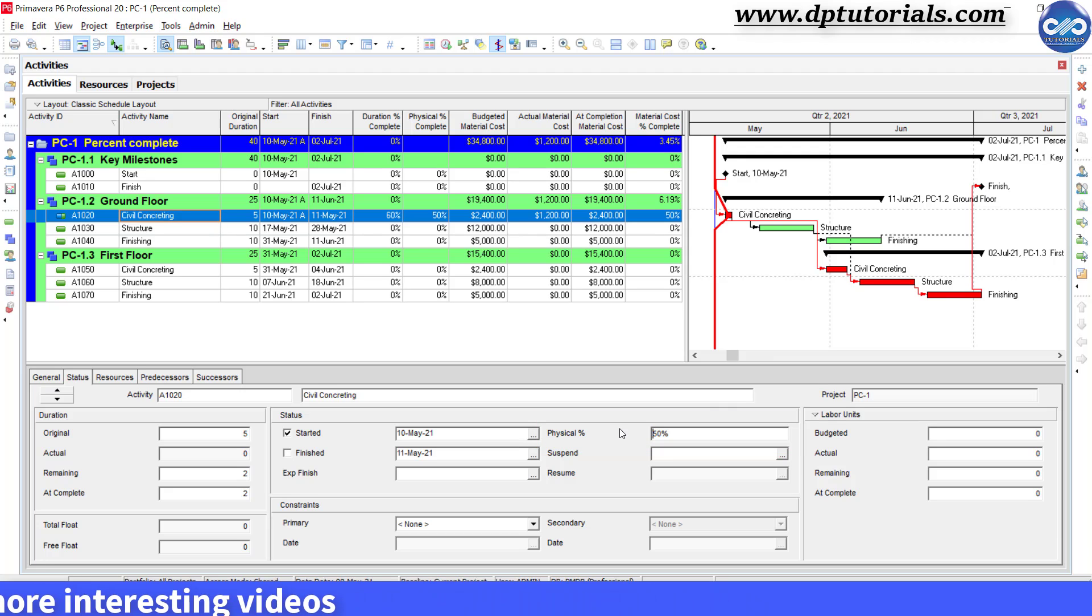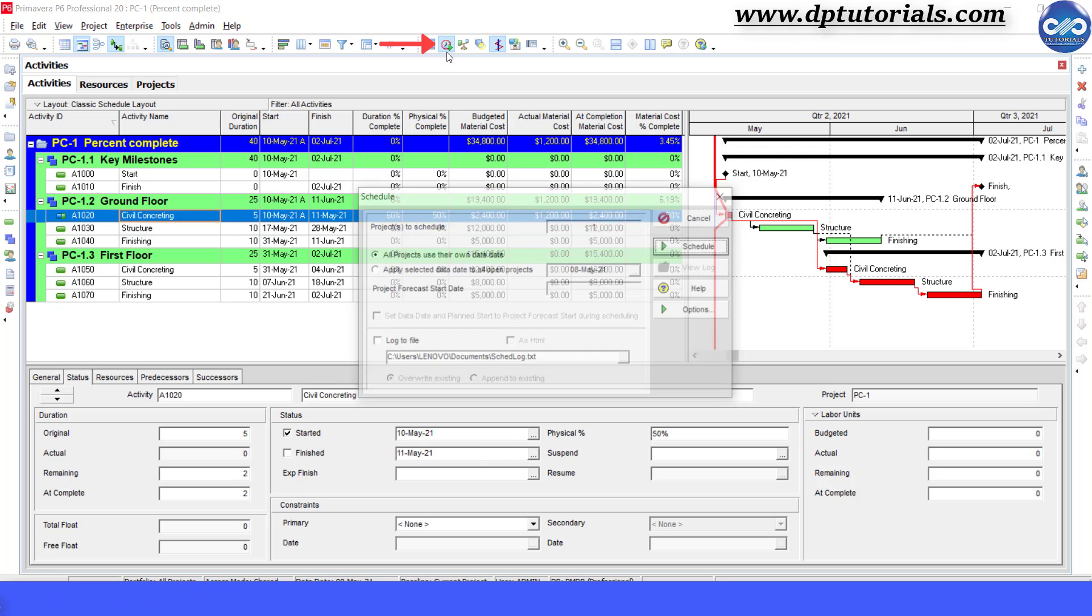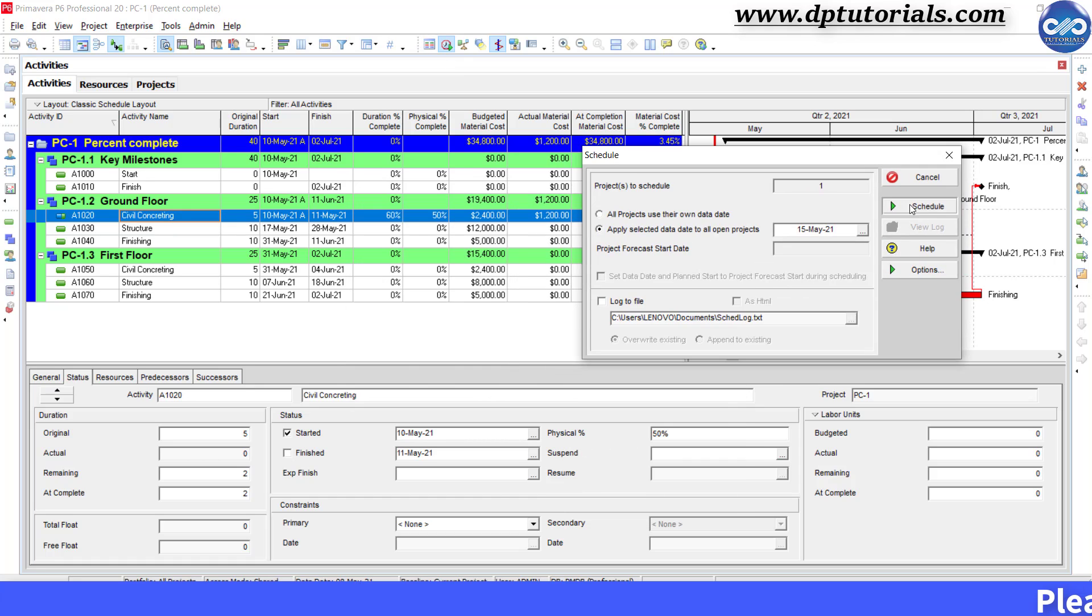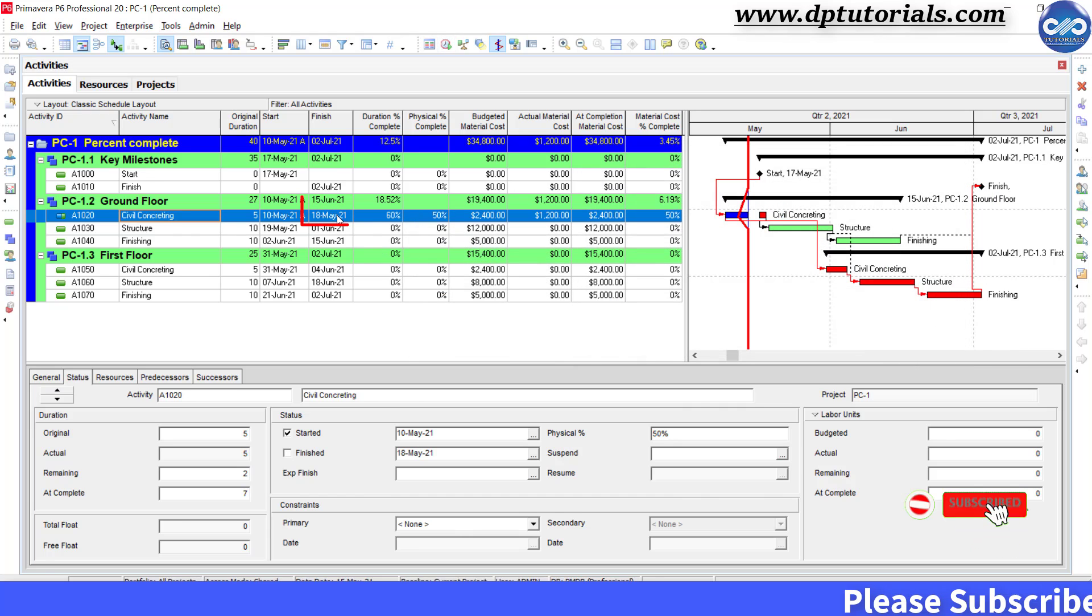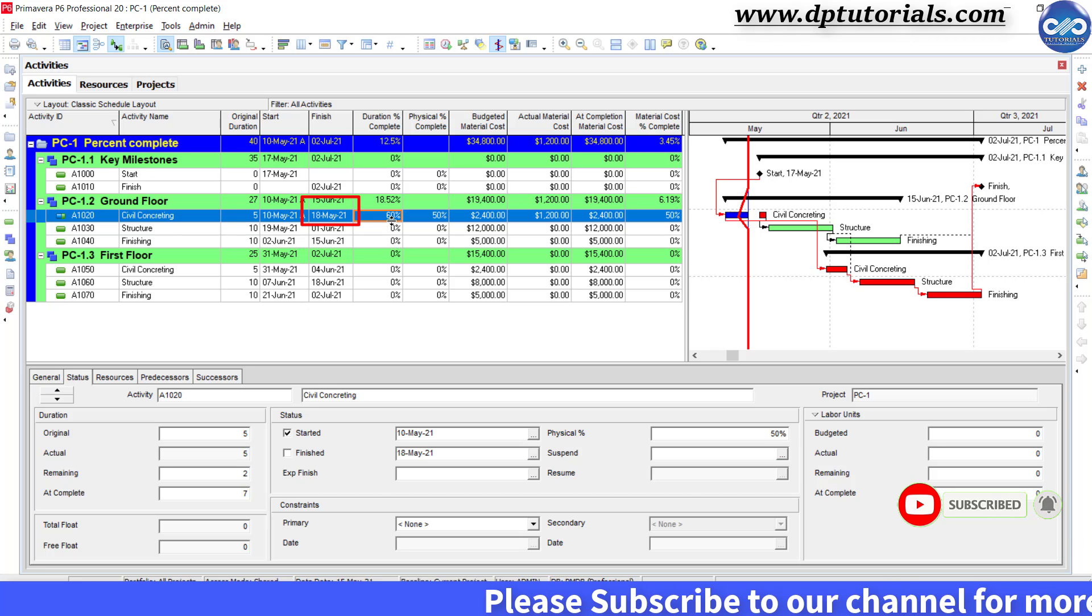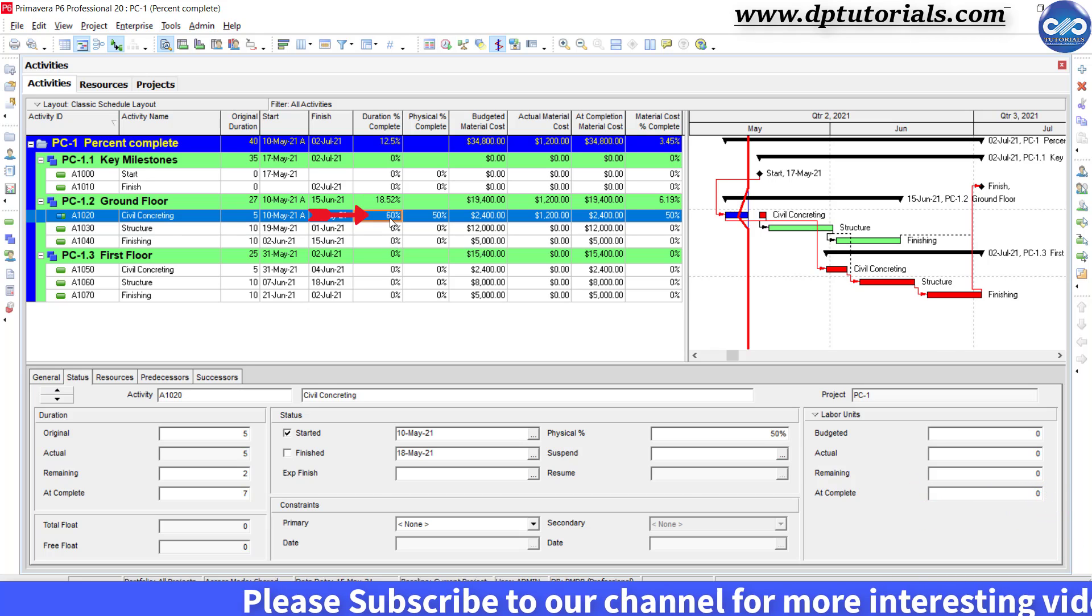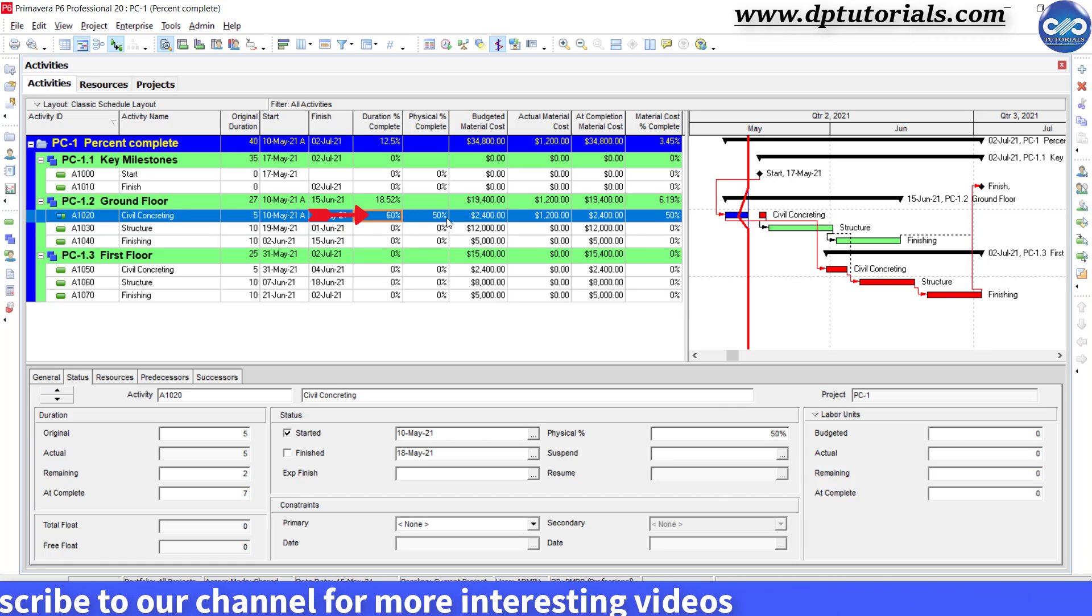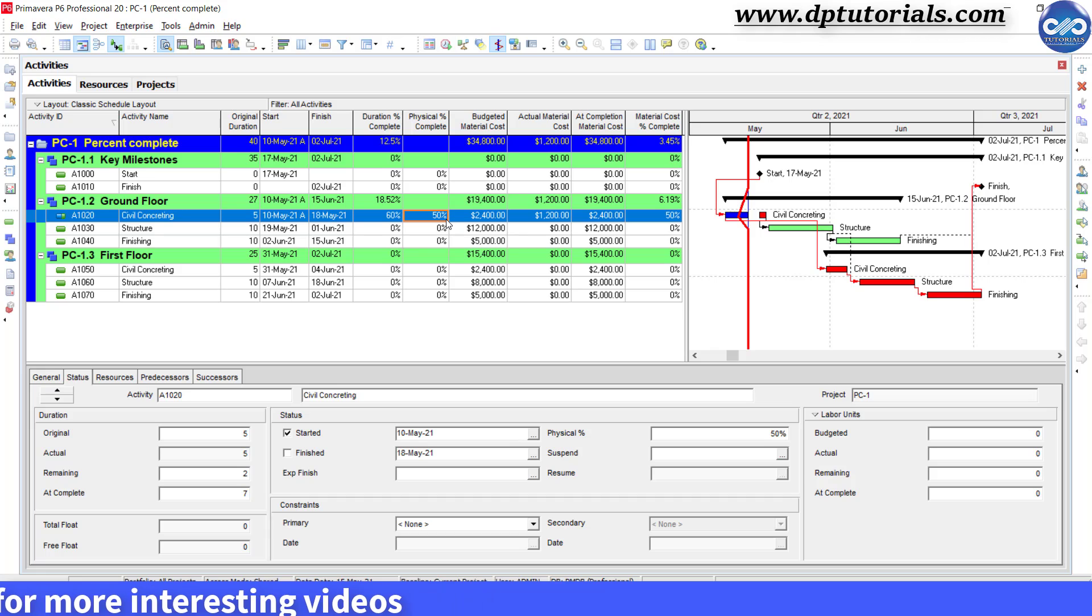Now, once you are done with the progress update, let us schedule the project with the new data date, say 15th May. Now we have the revised schedule, you can see the finish date as 18th May. Here you can notice that the duration percentage complete is 60% for this particular activity whereas physical percentage is 50%.